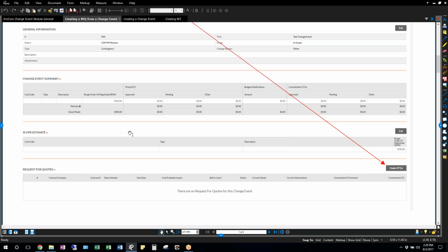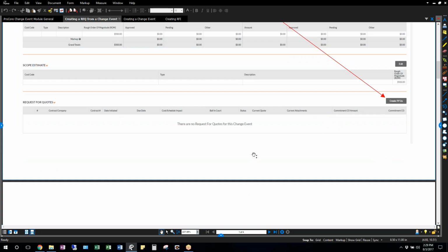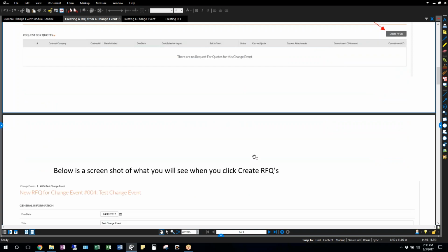Yeah, you would have to have them send in a CCD for what was approved or what wasn't, and then go back through and change all the pricing in there. So maybe an owner decided, okay, we're going to can this whole part, so their number goes from $5,000 to zero, or others just get halved because only half of the scope was decided to go forward with. Yep.